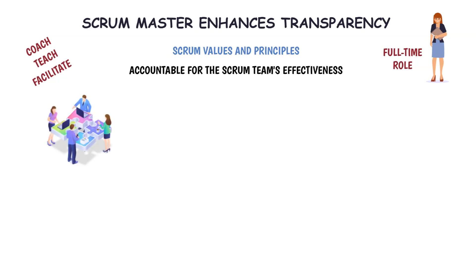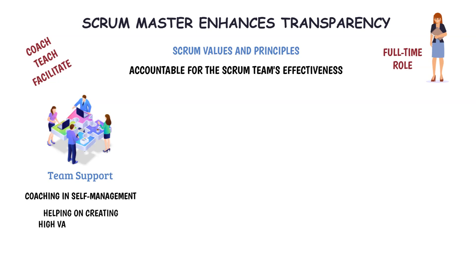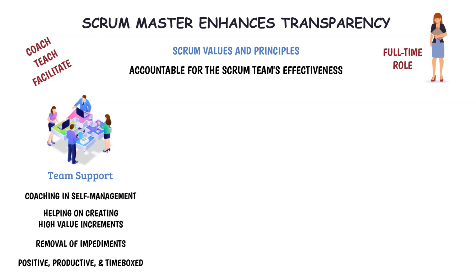The Scrum Master serves the Scrum team in several ways, including: coaching team members in self-management, as self-management is crucial for successfully adopting Scrum and moving away from the traditional command and control culture; helping the Scrum team focus on creating high-value increments that meet the definition of done by facilitating team decisions; removal of impediments — such as knowledge gaps, older processes, and organizational practices — because impediments may slow down team productivity; and ensuring that all Scrum events take place and are positive, productive, and kept within the time box.